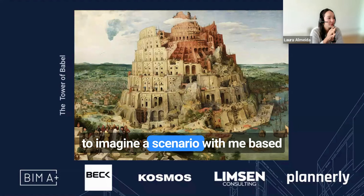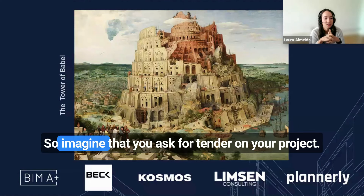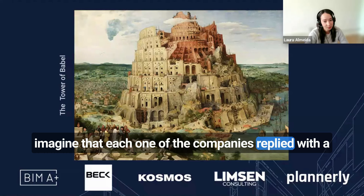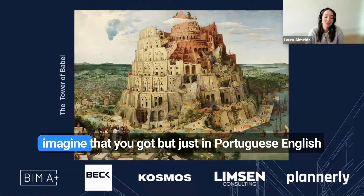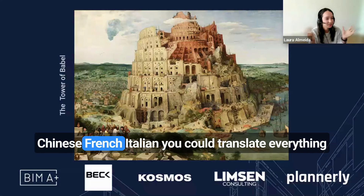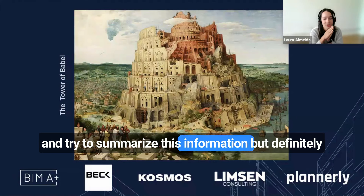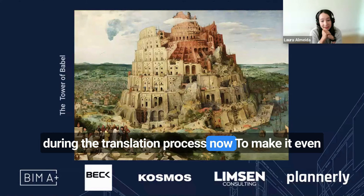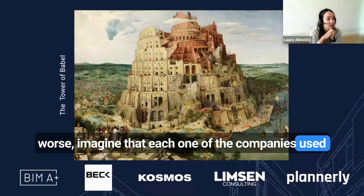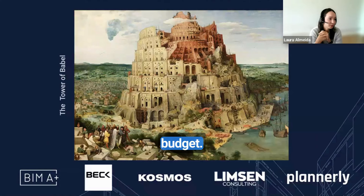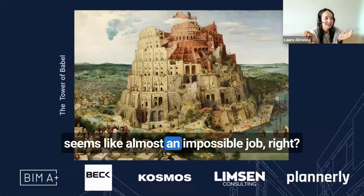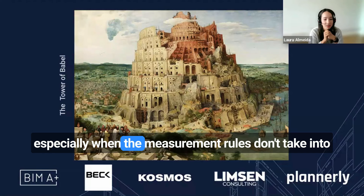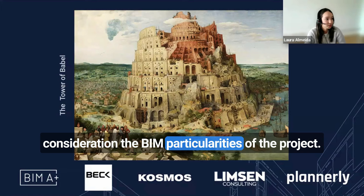Imagine a scenario based on the Tower of Babel: you ask for tender on your project, and each one of the companies replies with a budget in a different language — Portuguese, English, Chinese, French, Italian. You could translate everything, but some part of it would get lost. Now imagine each company also used different rules to calculate the quantities. Understanding and summarizing all this information seems like almost an impossible job. This is an exaggeration of a problem many companies face today, especially when measurement rules don't consider the BIM particularities of the project.